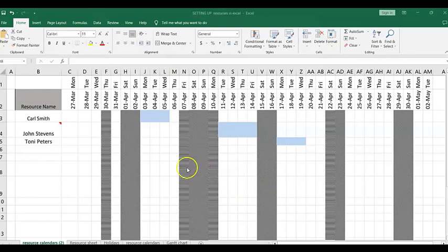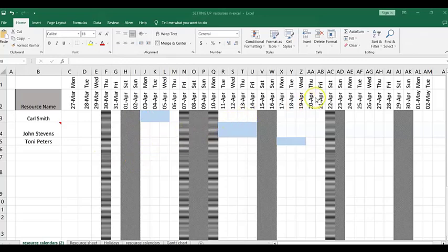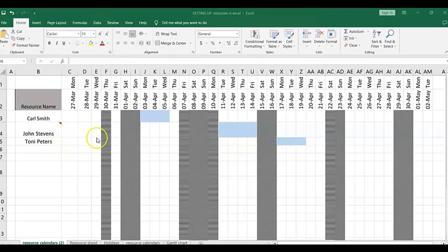Let's quickly deal with the resource calendar. I took the days from the Gantt chart — for example the 25th of April, which is a Tuesday — and I put in a column for resource name. So for Carl Smith, I can say he's going to be on vacation for a certain period, and John Stevens for another period. What we created was the project calendar — we identified vacation, Saturdays and Sundays, and any company holidays. Now you can also identify when different resources will be on leave, and you can set up a calendar for each one. This spreadsheet helps you see the entire resource sheet at one go.